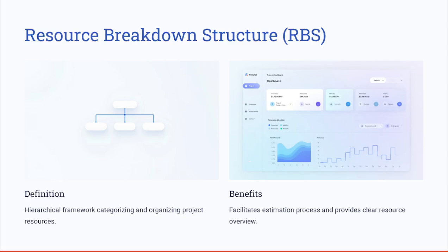Think of the WBS, how when we were defining the activities we broke down the project scope into deliverables, and these deliverables we broke down into work packages, and each work package has an activity list, and each of these activities might have some specific tasks. Think of the same concept here when doing the resource allocation. You need to consider each of the tasks and assign each of the tasks its required resources.